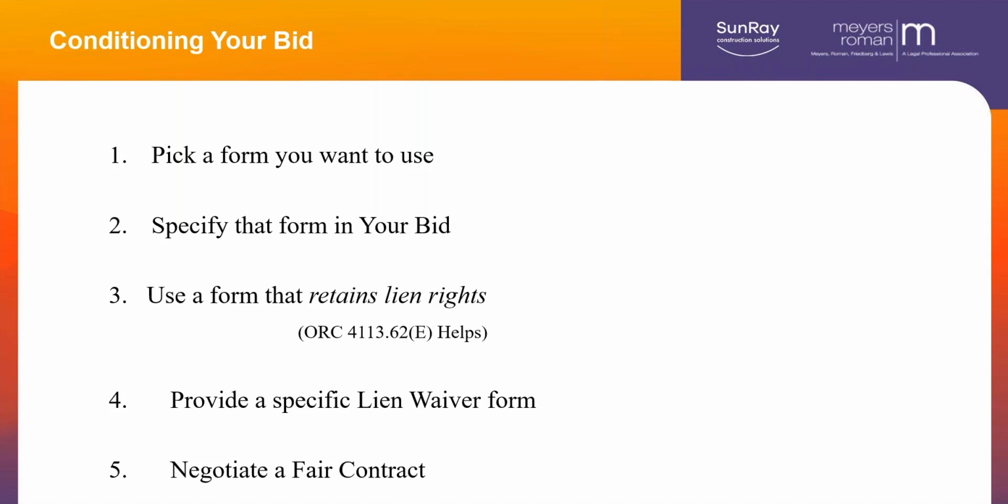also indemnifying them if any of your subs or suppliers file mechanics liens. So that can be a problem for you. It can be a huge problem. And you might have to bond it off. You may have to pay it out, any number of things.